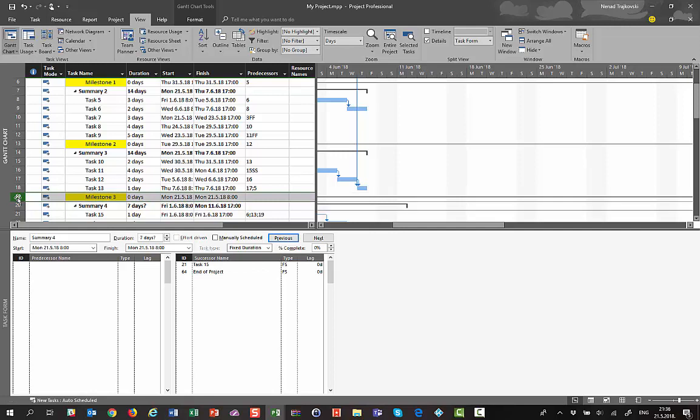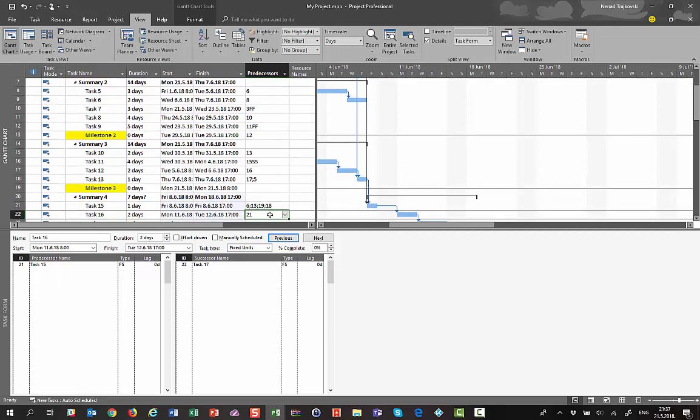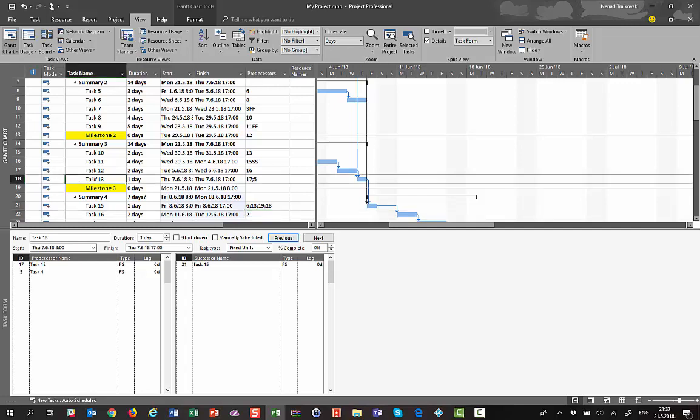because I don't need it anymore. And what I will do here is say that I also need task 18 as a predecessor. So I will put here task 18, and now I establish a meaningful schedule again without task 14, which doesn't exist anymore. Okay, this is when we use the type of predecessor and successor screen.